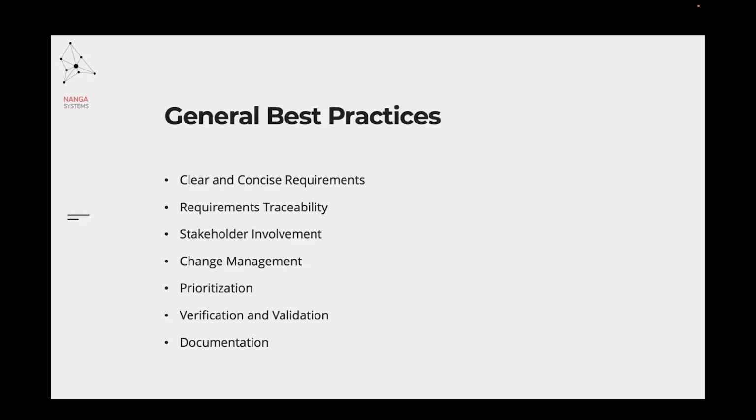Change management is the next one on the list. It's a best practice to implement a robust change management process to handle requirement changes, assess the impact of changes on cost, schedule, and scope before approval, and of course, before the implementation of the requested changes.